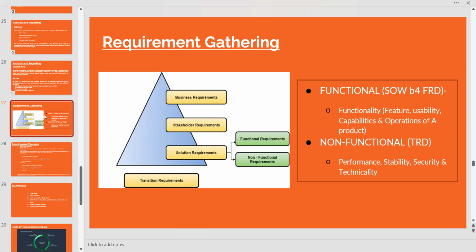So you come back to discuss that with your Scrum team, the Scrum master, and they'll discuss that with you. And then you'll say, okay, this looks like it is out of scope. Definitely we'll have to put in additional efforts. Let us check with the product owner also. So the first and foremost thing is we check: is it doable or not? Is it feasible or not?